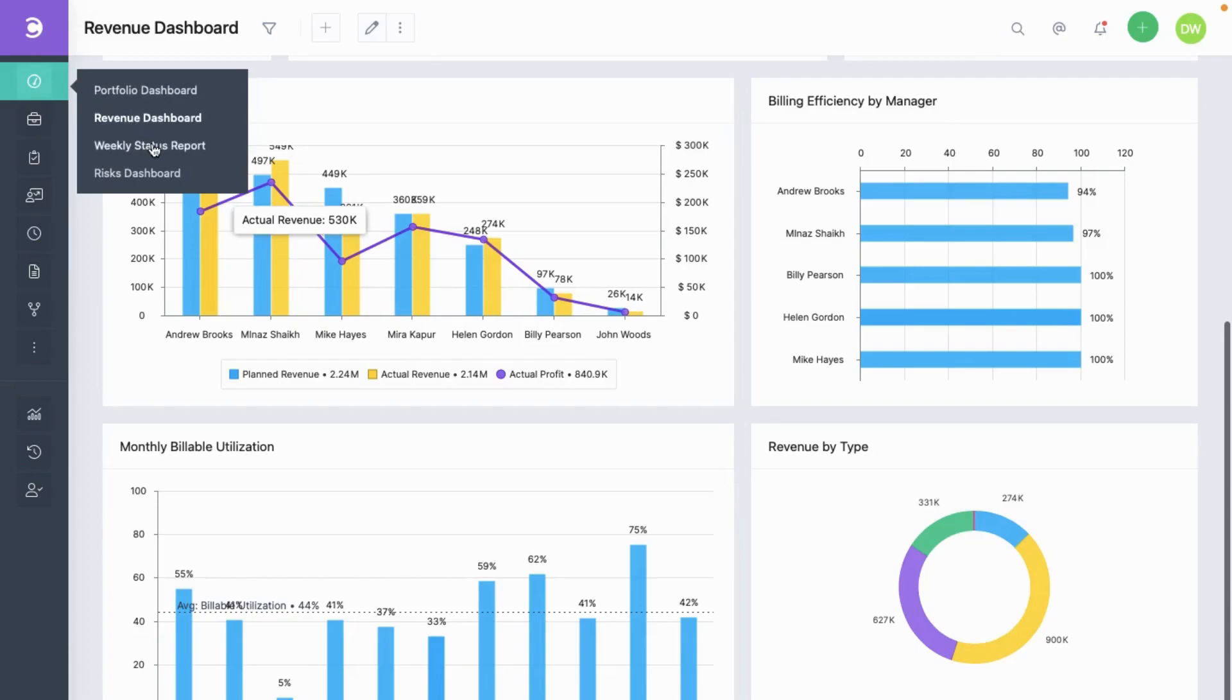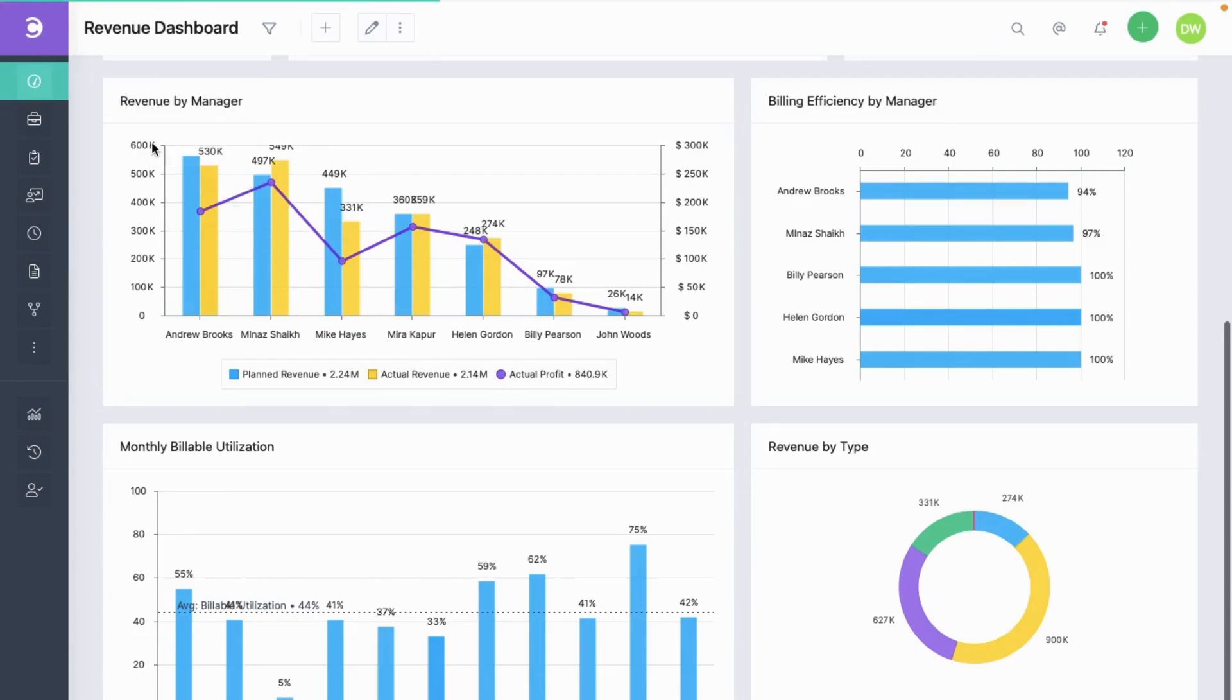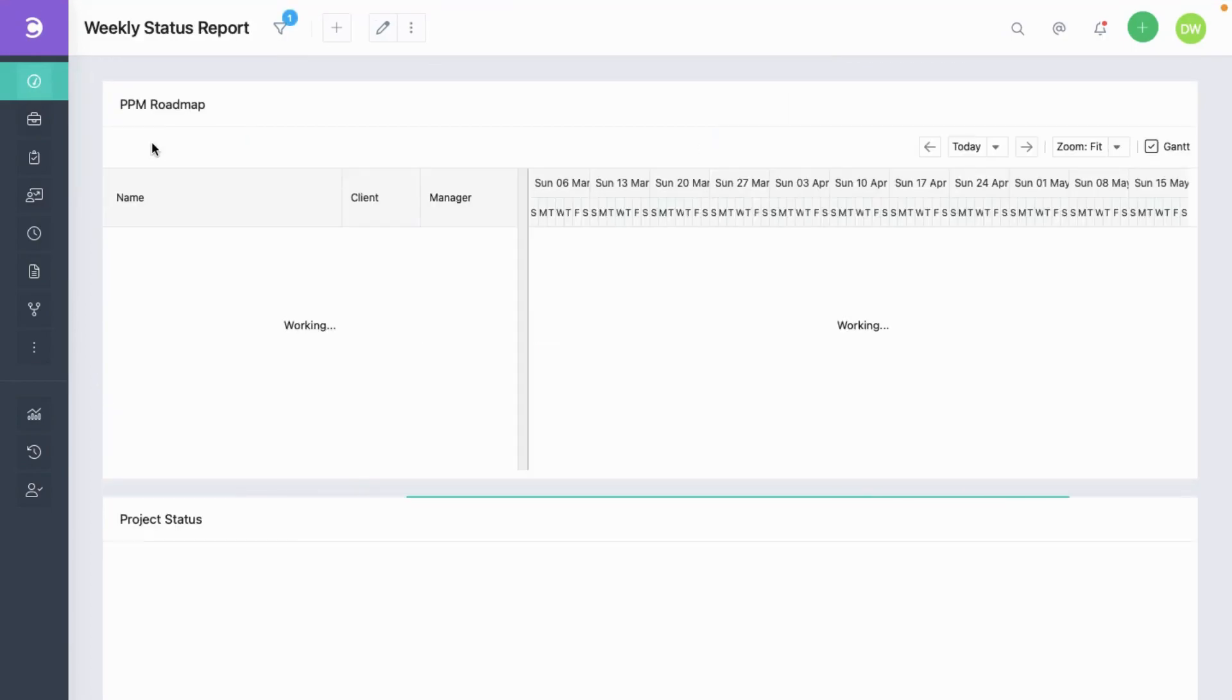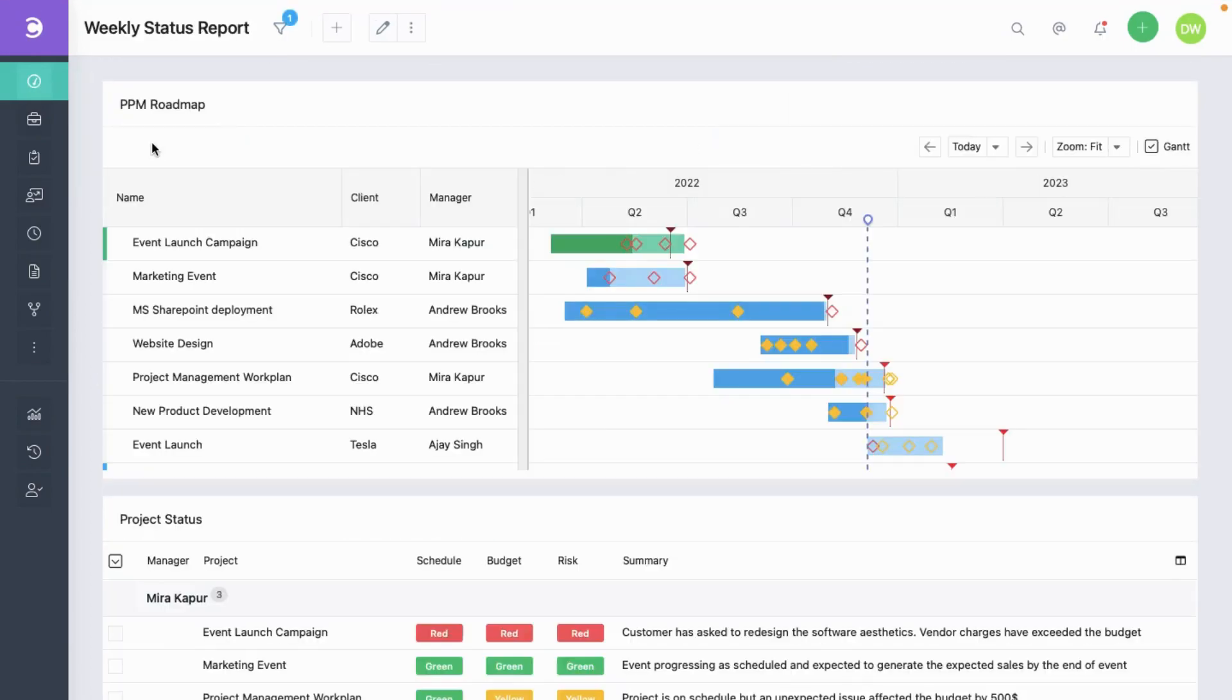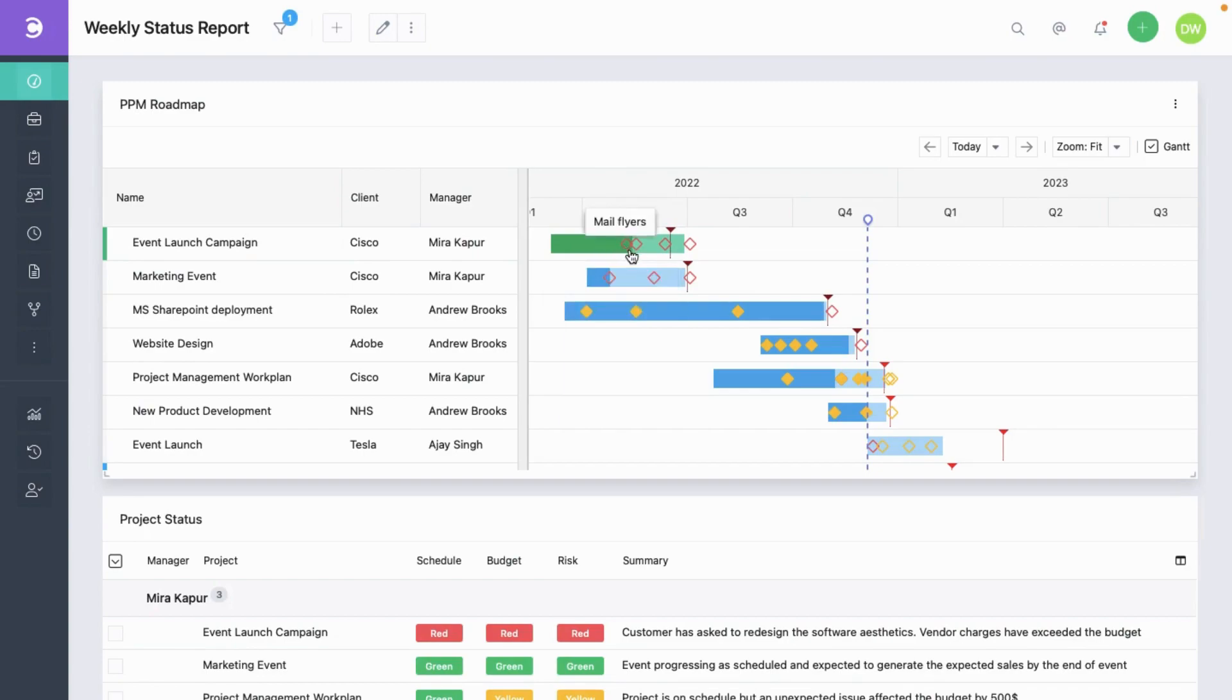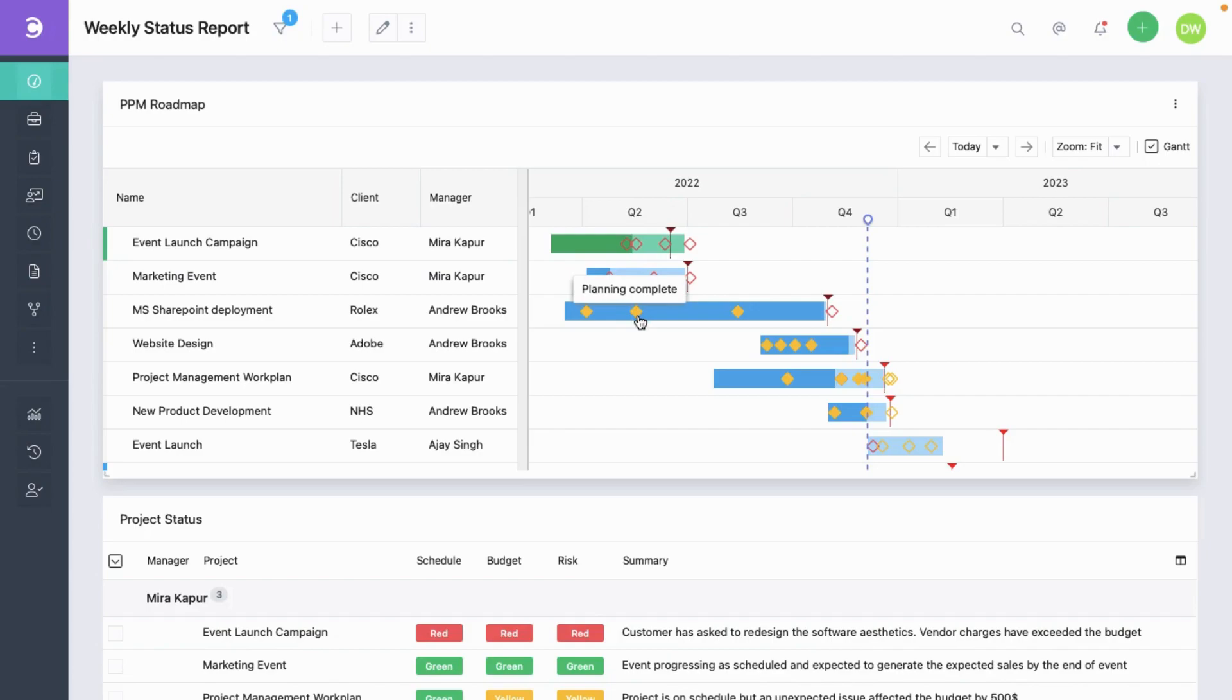Another dashboard is the weekly status report. This is a popular dashboard used by top management consulting companies. This here is a PPM roadmap. It is a Gantt view showing timelines as these bars, and milestones as these diamonds for each project. An empty diamond like this means the milestone is still not achieved, while a filled one like this means it is done.